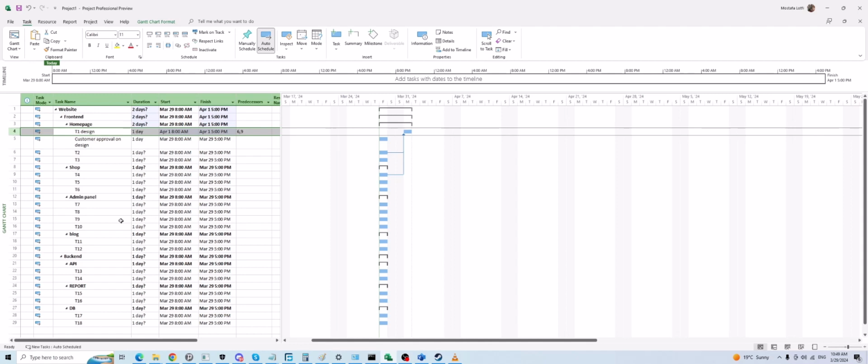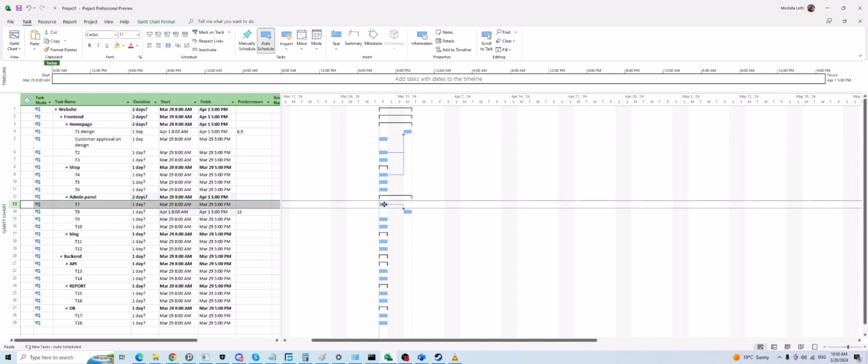For example, you completed your purchase process, and now you have to wait 2 weeks to receive the servers. Those 2 weeks are a lag. Let's say I'm linking these two: this one is purchase the server, this one is receive the server, and the lag is 2 weeks.